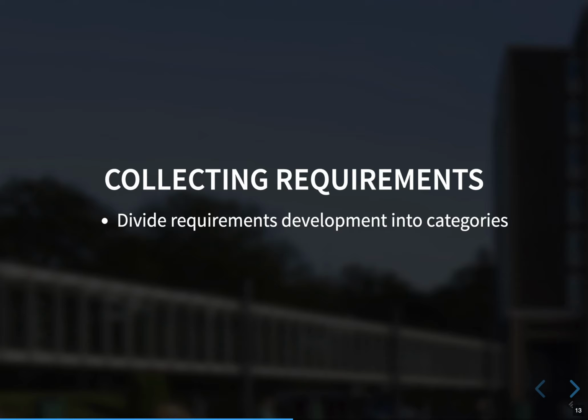Here it is important to use an iterative approach to defining requirements since they are often unclear early in the project. Start collecting the requirements. You may not have all the requirements in the beginning; they are unclear or not complete. So by iterating, you get closer and closer to all the requirements and get more details on them.